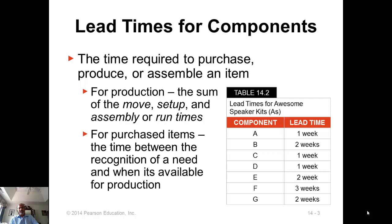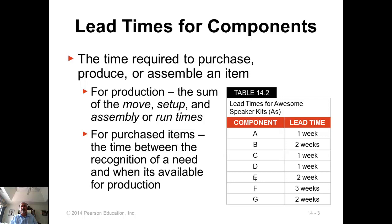Here is an example of the bill of materials we saw in the previous video. For each of these items — A being the top-level item and the others being components — if these are the lead times, one thing we can do is figure out what is the overall lead time to producing the final product A. Remember, that is not simply a sum of the lead times, because some of these items can be produced in parallel.